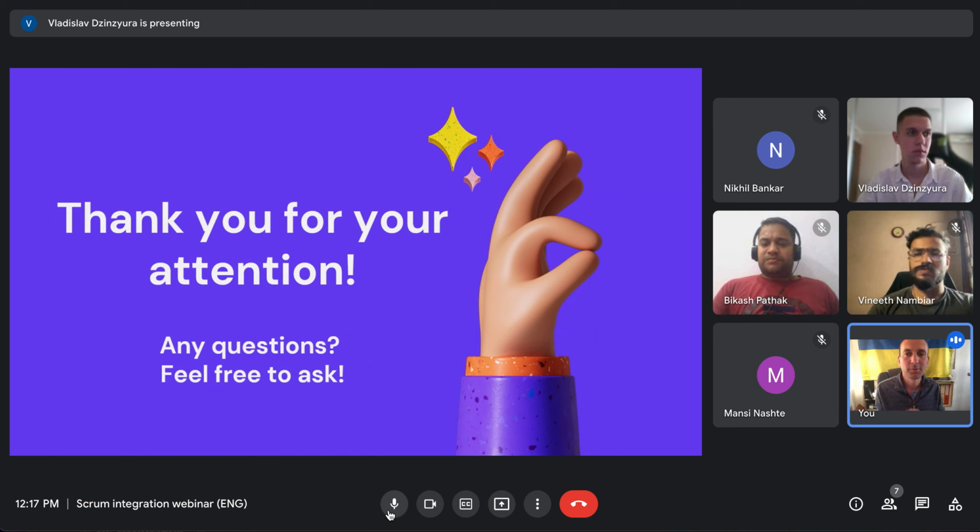Obviously, if you're using some methodology, some ground rules should always be followed. One of those rules is time boxing, and we can afford to follow that rule. If we know the time of the release approaches, we can move things which are not completed into the next sprint, to the next milestone, and start the completion process of the current release.